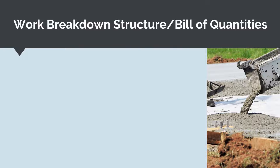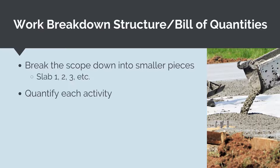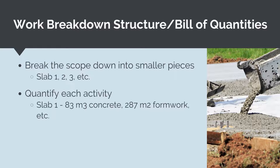What we want to do is break the project scope down into component pieces. For example, if the scope we are pricing has several different concrete slabs, we could break the scope down into slab 1, 2 and 3. Next, we want to measure or estimate each of the key quantities for each activity. For example, for a concrete slab, we will want to know the cubic meters of concrete, the meters squared of formwork, the tons of steel reinforcement and so on. We will either need to measure these quantities from the drawings or estimate the quantities using estimating rules.